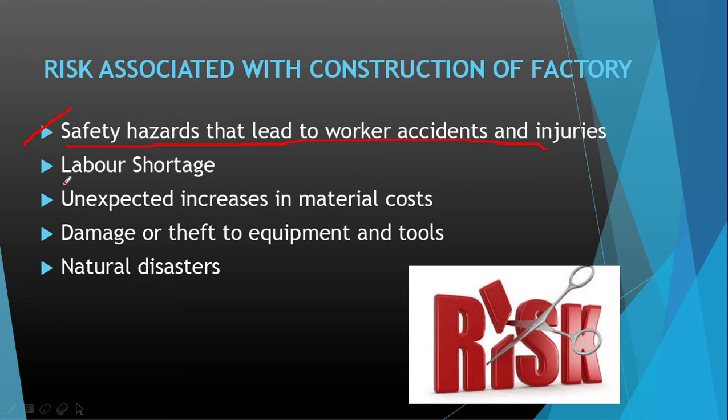The other risk is when there is shortage of laborers. Such events happen especially when the area of construction is a Naxalite area. Labor shortage can cause any project to delay. Thus, it is very important to deal with this contingency before the start of the project by employing a few extra workers by paying extra money.